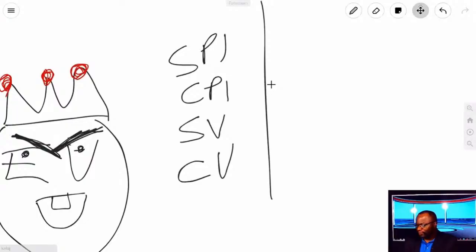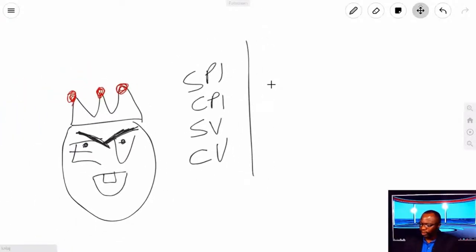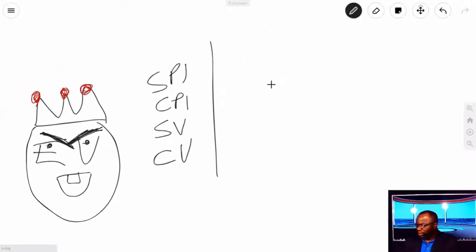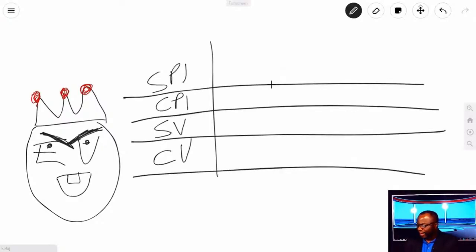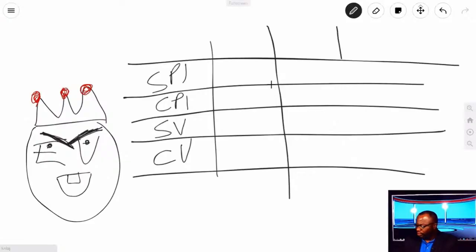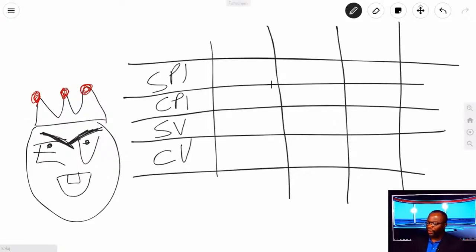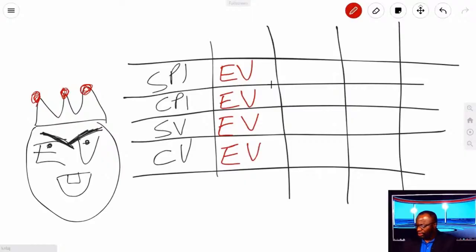In all of these, folks, every single one of them, we need to put earned value first. For those of you who haven't watched my video on earned value, the simple way of remembering all of this stuff is earned value comes first. Earned value is king, okay? It's a simple statement. I took 3 minutes of your time to draw that ridiculous visual so that you would never forget. Earned value is king. It always comes first in all of these formulas.